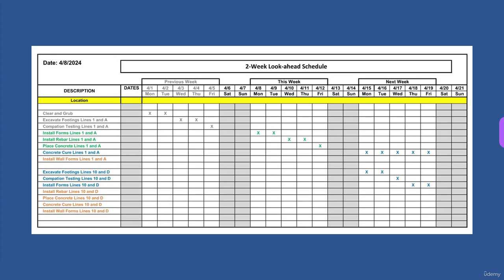You don't have to do this if you prepare one. You can if you want. I did it just to show you how this moves. And then you'll see that all those items in gray, there's 3 of them. When you get to the subsequent week, now you can see the 6 items in gray. And in theory, the ones above you'd probably drop off because, again, somebody might ask. So you'd probably take those first 3 activities off because they were completed the week before.